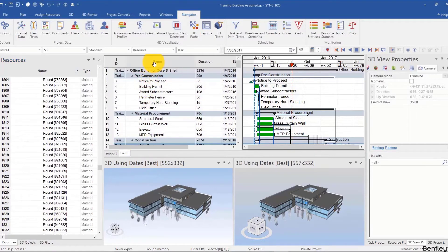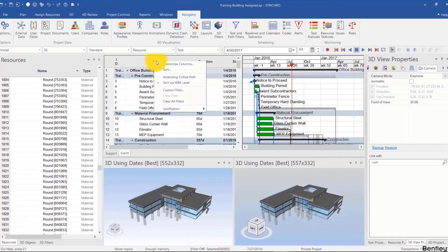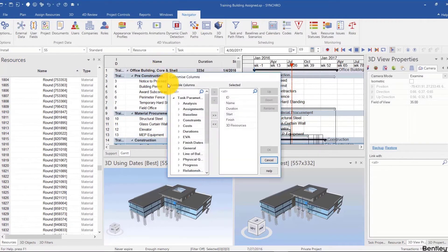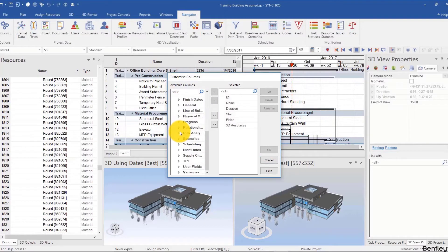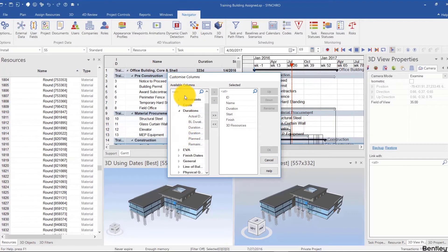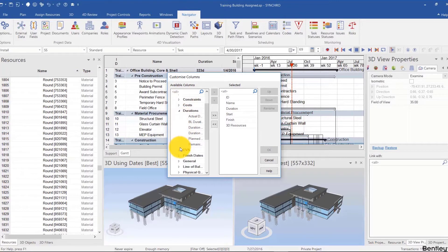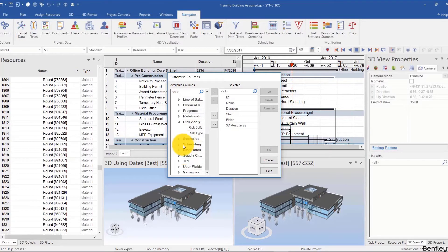In my Gantt chart, I can right-click like any scheduling software, customize columns, and add any parameter or user field that I want—float, baseline duration, anything that's relevant.